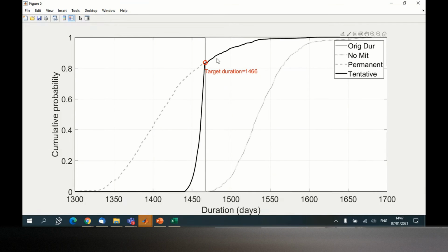No problem. So these two are for comparative reasons. So you can see there is this difference between the curve where you apply all of your measures and the curve where you apply only the effective measures, of course, which the mitigation controller does. You can see the difference here, and this difference represents additional benefit that you don't need. So it's additional cost. This is additional mitigation measures that you implement and you don't need.